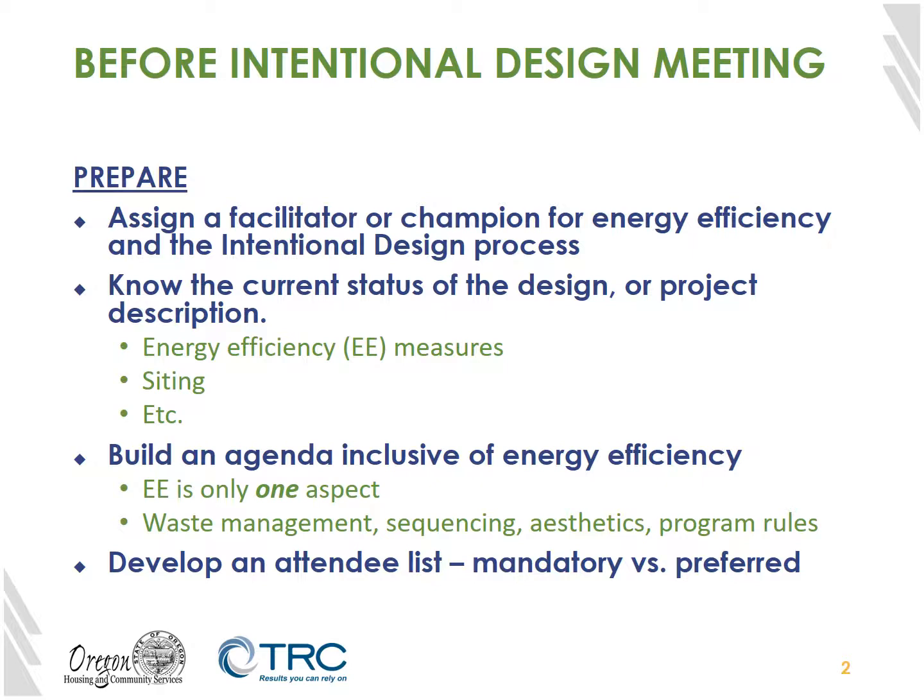Finally, develop an attendee list with 2 columns. On the left column should be all the mandatory attendees. This should be at least 1 representative from the development company, the architect, the HVAC engineer, and the project manager, as well as the energy consultant if they are not already the energy efficiency champion.